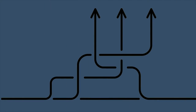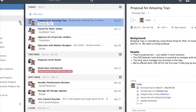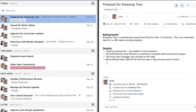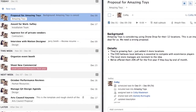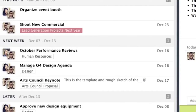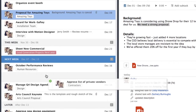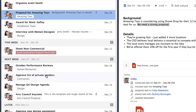Handle scope management from the start. First, gather project requirements to ensure you can deliver what stakeholders envision. Get on the same page with online applications, such as Wrike, that allow users to list all the specific tasks that correspond to project requirements. You can drag and drop each task's place on your timeline to accommodate any unforeseen scope changes.